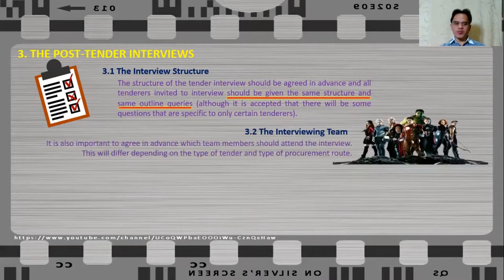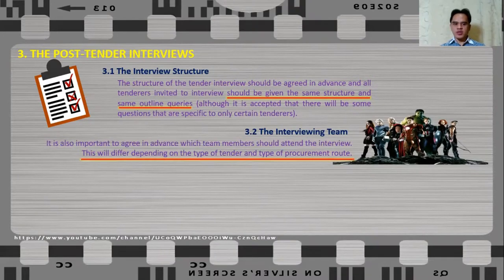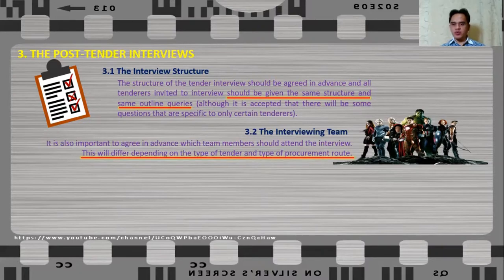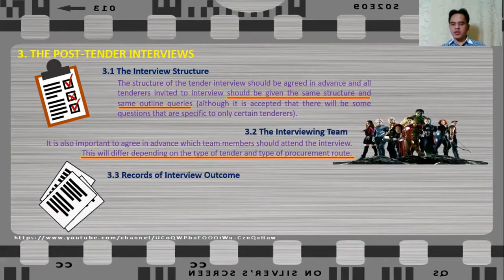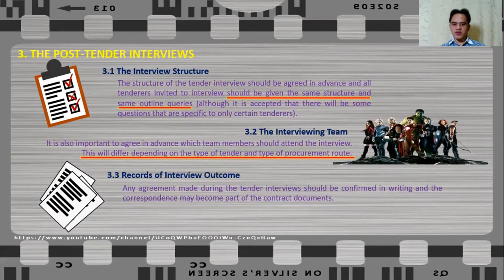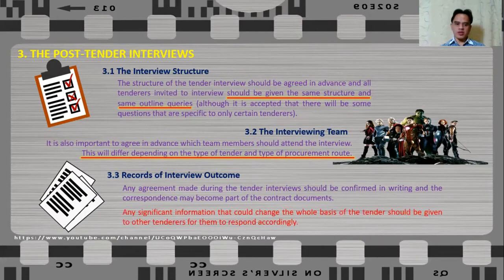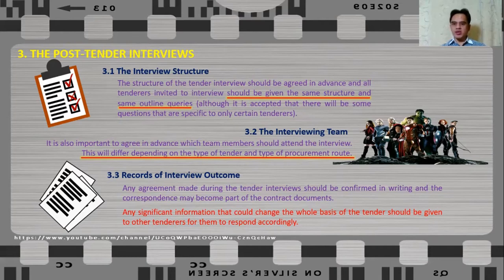Next, prepare the interviewing team — agree in advance which team members should attend. This will differ depending on the type of tender and procurement route; for example, in a two-stage tender, the tenderer may be interested to meet the team in charge of negotiation for the second stage. Most importantly, record the interview outcome — any agreement made during the tender interviews should be confirmed in writing, and the correspondence may become part of the contract documents. Any significant information that could change the whole basis of the tender should be given to all other tenderers for them to respond accordingly, to maintain a like-for-like basis of tender analysis.